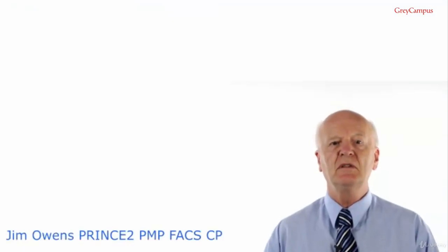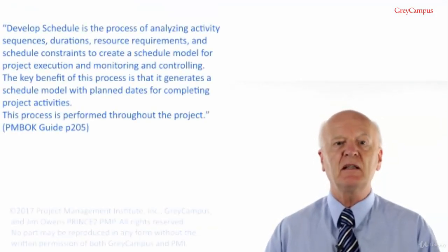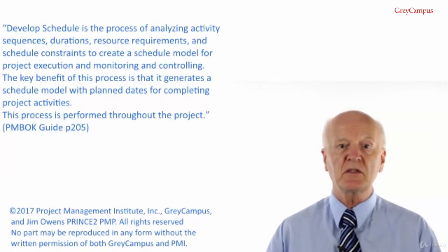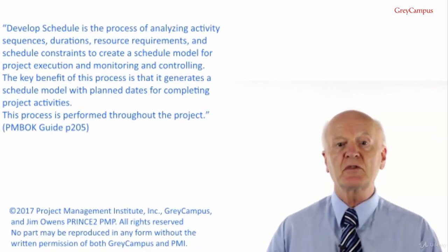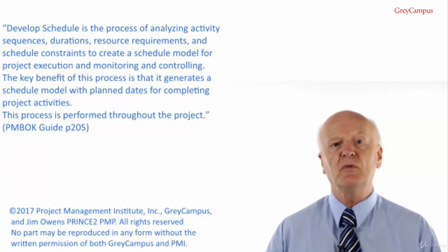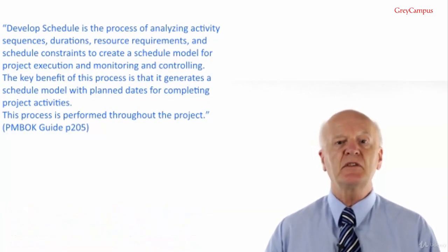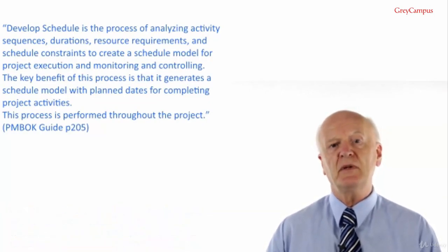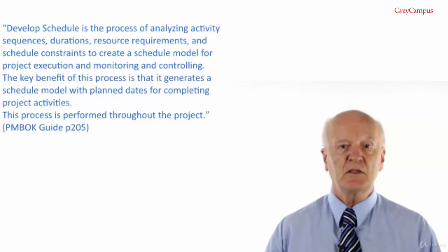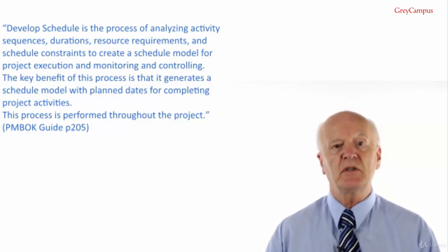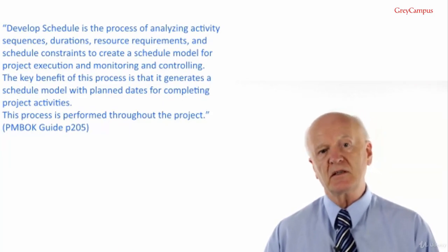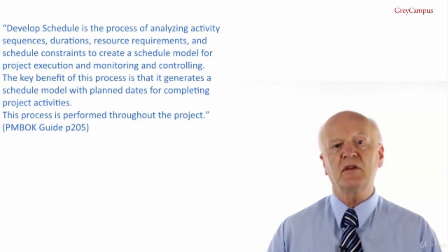6.5 Develop Schedule. Develop schedule is the process of analysing activity sequences, durations, resource requirements and schedule constraints to create a schedule model for project execution and monitoring and controlling. The key benefit of this process is that it generates a schedule model with planned dates for completing project activities. This process is performed throughout the project. The inputs, tools and techniques and outputs of this process are depicted in figure 6-14. That's PMBOK Guide, page 305.